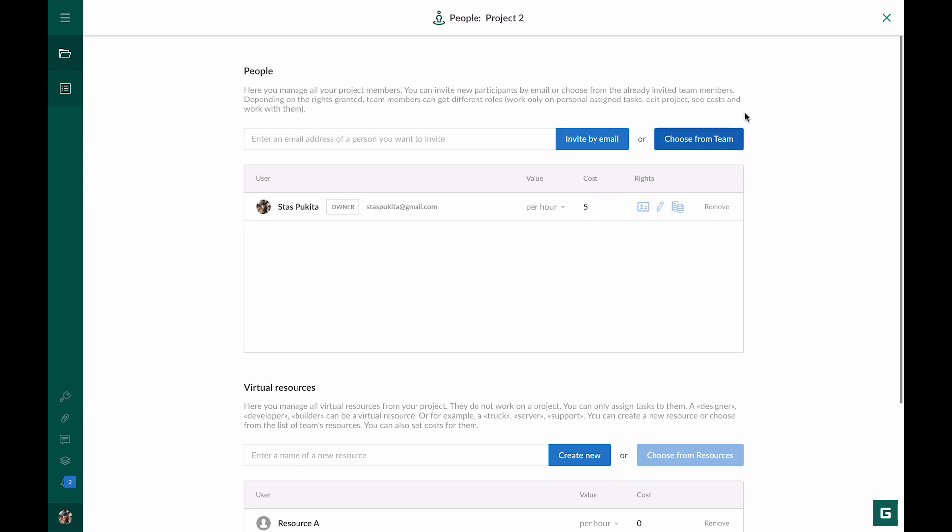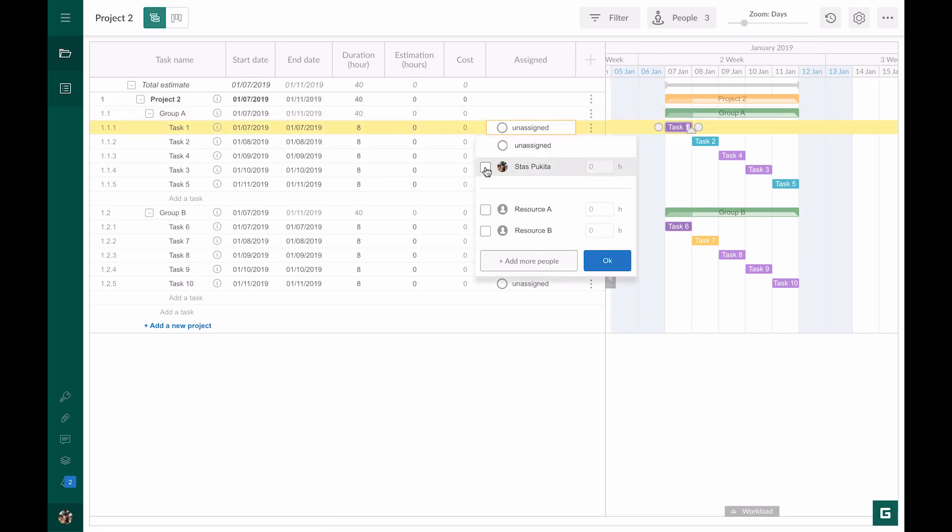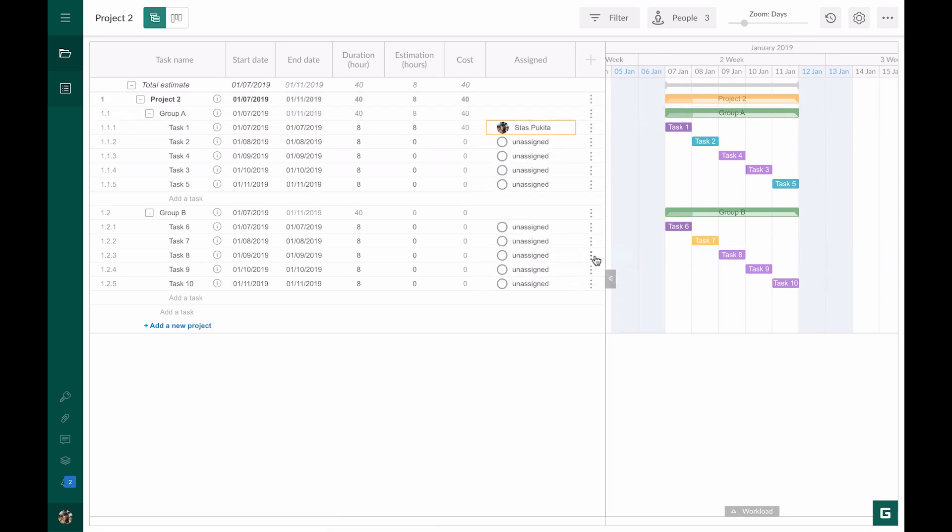We go back to our project and assign Task 1 to this resource. As the task lasts 8 hours, the estimation will get the same value by default. But if you need, you can change it. In the cost column, we see 40. This is the result of multiplication of $5 by 8 working hours.